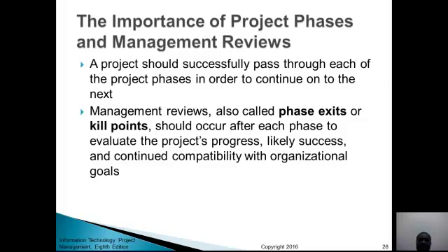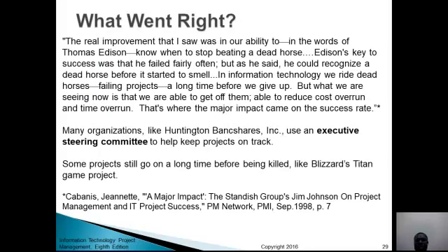You must start everything again. So management reviews, also called phase exits or kill points, should occur after each phase to evaluate the project progress, likely success, and continuing compatibility with the organizational goals. You weigh each of the stages after you complete. So let's look at what went wrong. Here's what went right. The real environment that I saw was in our ability to, in the words of Thomas Edison, know when to stop beating our dead horse.